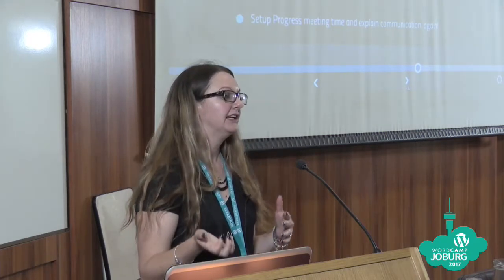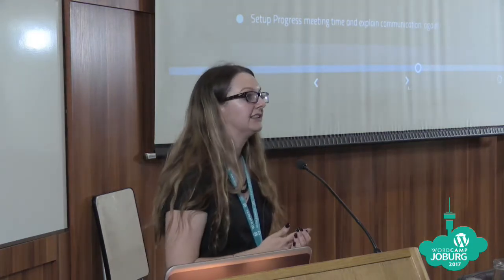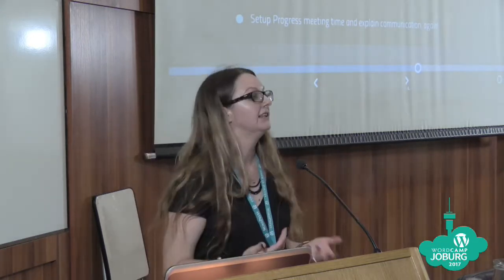Okay, so the next step is the onboarding, and this is once the contract is signed, getting them, welcoming them on. We either start with a kickoff meeting or a discovery workshop. If we did a discovery workshop before the proposal, we will only do a kickoff meeting. If we haven't done the workshop, then after the first payment, they will do the discovery workshop.